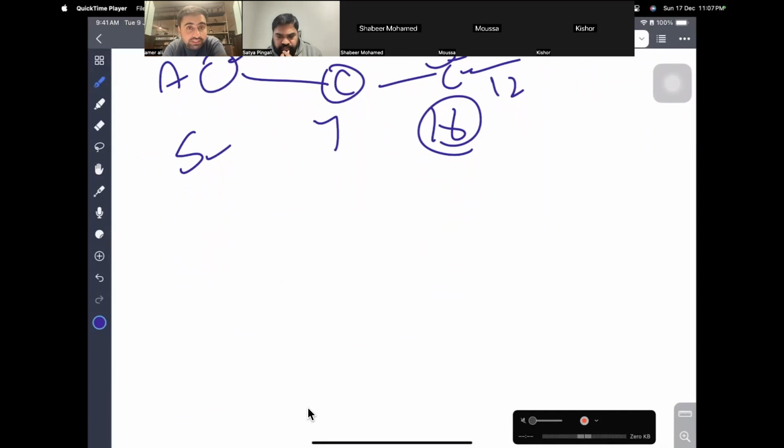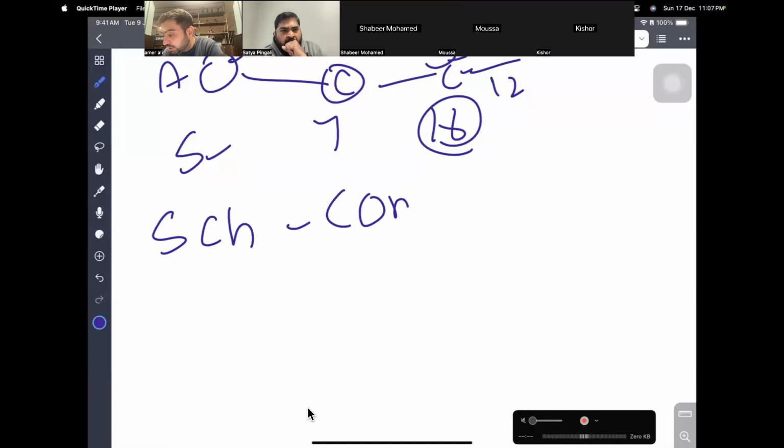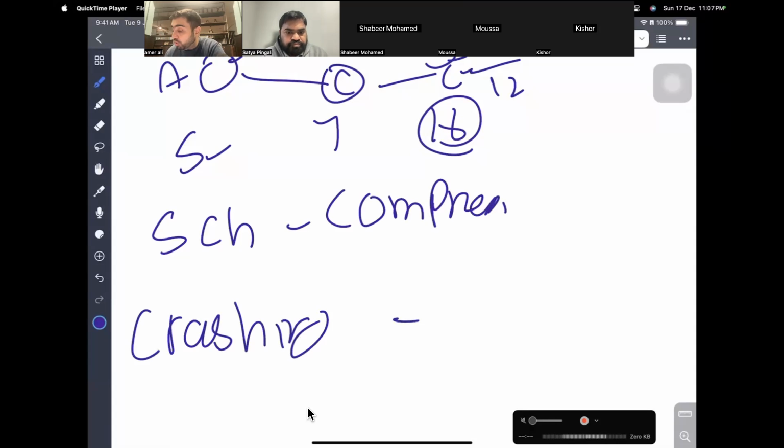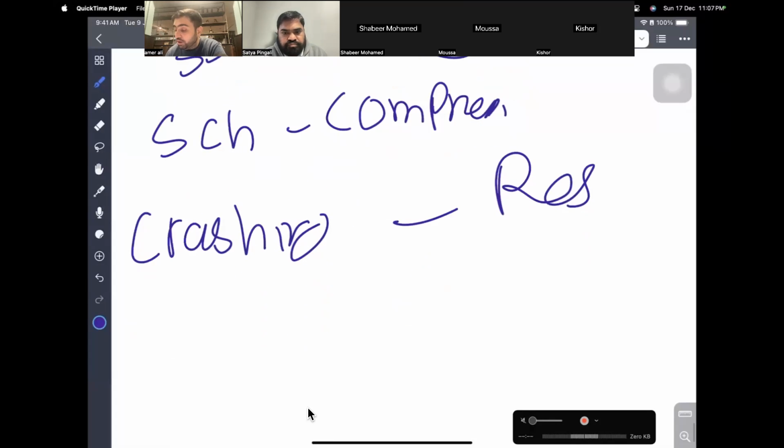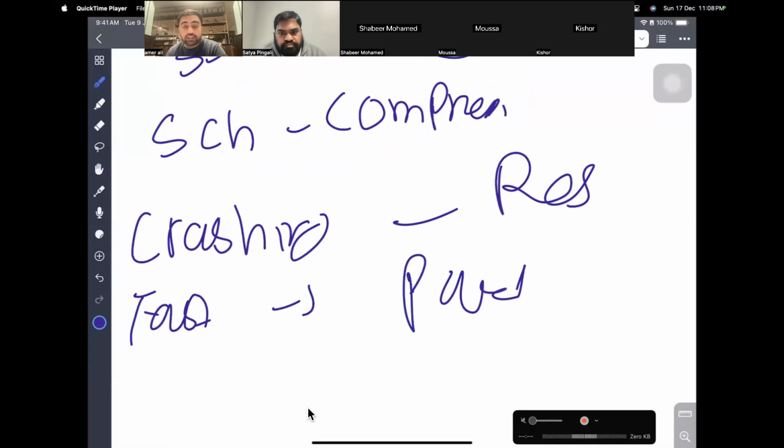Once your schedule baseline is done, you have a Gantt chart, network diagrams. You will show it to the management. If the management wants to decrease the schedule, we need to do the change request. We have two ways to decrease the schedule, compression: crashing, adding more resources to it, or fast tracking, making the activities parallel. This will increase cost. Okay, this will increase risk.